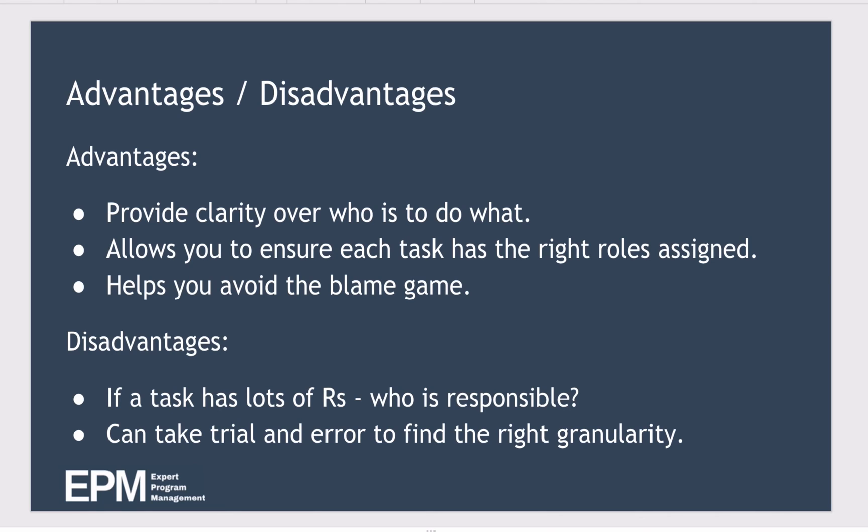Another disadvantage is that it can take a bit of trial and error to get the right level of granularity. If you list down every single task it can be too much detail, but if you work at a very high level it may not be enough. It takes some trial and error to work out what's exactly right for you.